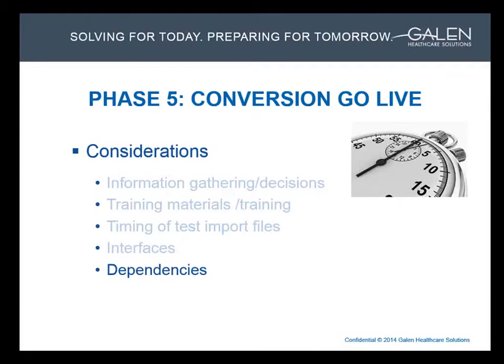course, but there are lots of small examples to keep track of too, such as the results verification we already talked about. Another example would be identifying whether tasks, such as med renewal tasks that might be coming in electronically even, need to be worked prior to conversion. If there are reminders in the legacy system that the providers would like to have access to, do those need to be rebuilt in the target because they're not going to be included in the conversion, for example? Those are just a couple more examples from my experience that should be discussed and understood.